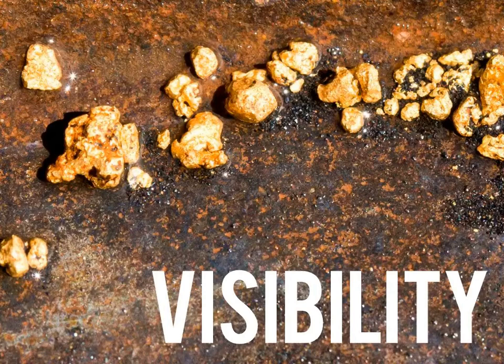So what would be the gold nuggets that are getting lost in that minutia? That would be, for example, your key performance indicators. Maybe you want to measure man hours, equipment hours, and quantities completed as you're monitoring the performance of your project. So let's say you had 150 data points per month, and you go for 36 months for those 3 key indicators. So there you got 5,400 data points, and those data points are constantly needing to be managed and updated.